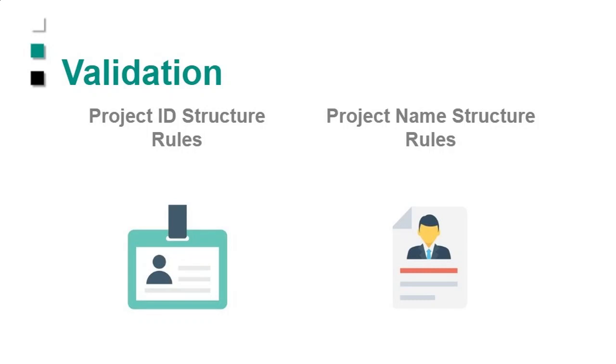And if you do a lot of importing, if you're an owner or an engineering firm and you're importing a lot from contractors, for example, this can save you a heck of a lot of time. If you're a contractor and you have to send your P6 files to your client, there may be all sorts of data you don't want to show them, right? So you might have resources that you don't necessarily want to show them because maybe it's a lump sum job and you don't have to provide a resource loaded schedule, okay?